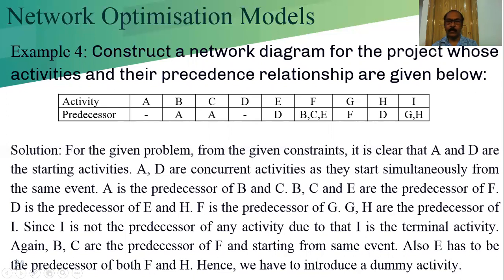Also, E has to be the predecessor of both F and H, that we have to check, and hence we have to introduce a dummy activity.